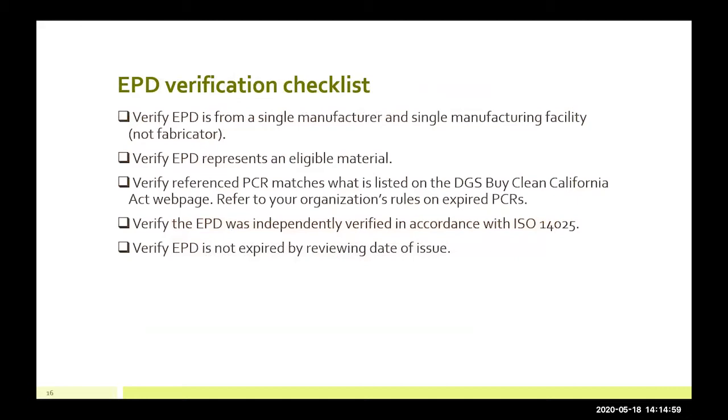Second, you want to verify that the EPD represents an eligible material that is called out in the law. Third, verify that the referenced PCR, or again, the set of guidelines that's used to develop the EPD, matches what is listed on DGS's Buy Clean California Act webpage. So we'll have the PCRs labeled on our webpage next to our limits that we have calculated.